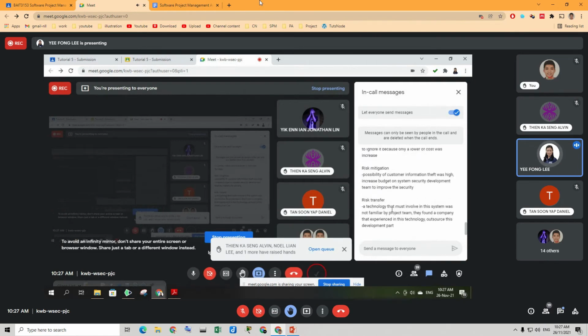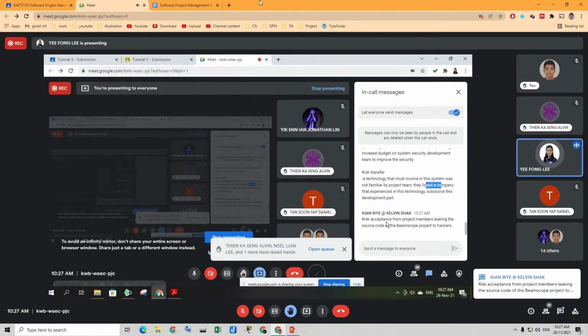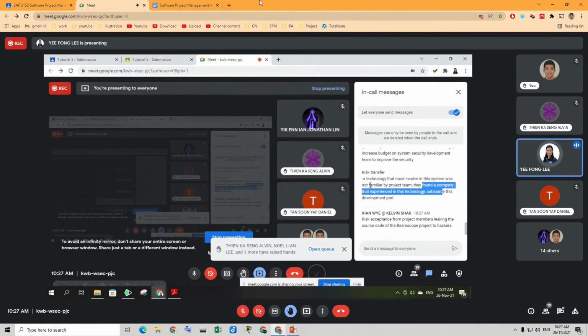A technology that must be involved in this system was not familiar to the team members, so they will find a company that is experienced in this technology, outsource. Okay, so they are looking for someone. Yes, they're transferring the risk to another party. Okay, that's what you mean. Then come back to here.